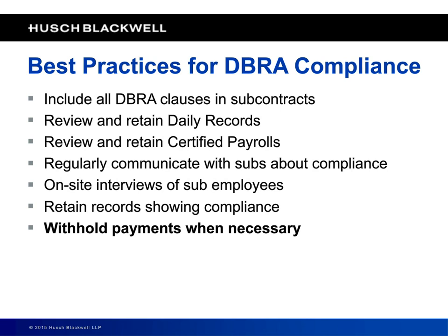Secondly, you have to have some sort of record in addition to the certified payroll to establish who is at your job and how many hours they work. And I'll get to that in a second, but I believe you need that. Now, there's nothing in the regs that say you have to have this, but it's my view, as a best practice, it is extremely important to have this record so that when you receive a certified payroll, you have something to check it against.